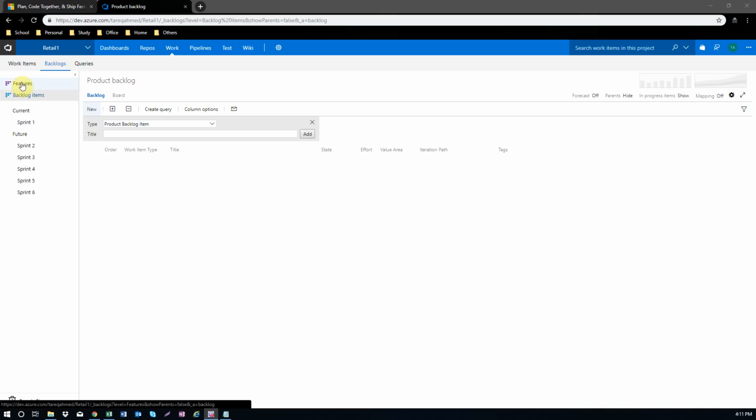Epic is basically a big user story, multiple features together. An Epic is basically a business-level story that came from the business people, and it can be achievable in a month or a couple of months, in a release or a couple of releases. It's a very big chunk of the product. Features are basically a small part of the application, consisting of multiple user stories. It becomes a feature, and this can be achievable in a sprint by a team. A whole team is going to work on different features. A backlog item, basically your user story, is a very small part of the area, and a user story can be done by a particular team member or a couple of team members together.